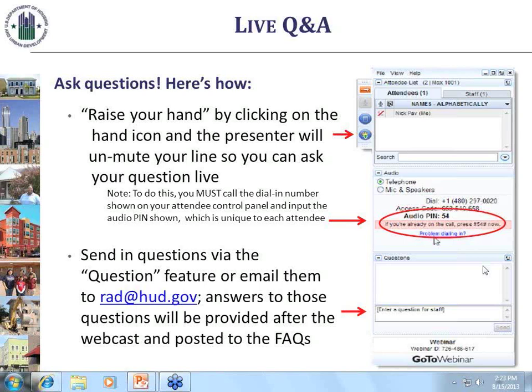If you are not spending it, but just really want to make it part of the deal, part of the development budget, in which case we approve your financing plan, and then at closing, you don't have to follow public housing procurement rules. Once you close on the project and you've identified, I'm putting in $500,000 of my reserves towards this particular project, we don't impose any procurement rule once you close. It's just prior to closing, until we really know you've got a live deal, that at least you have to follow public housing rules in spending those pre-development expenses.